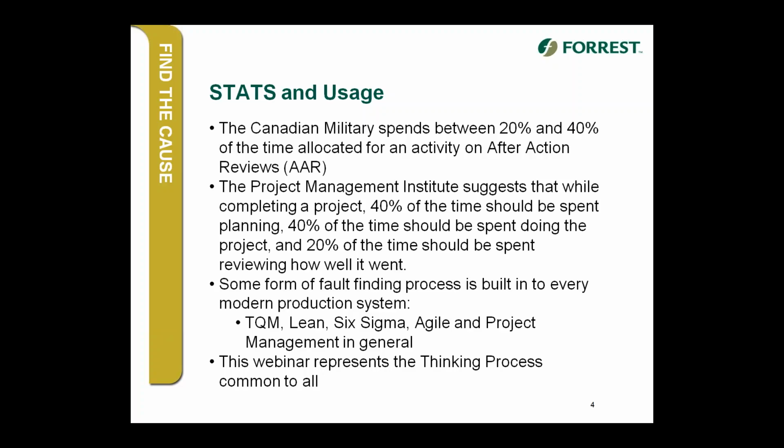The Canadian military, which I was a member of for quite a while, spend between 20 and 40% of the allocated time for a specific activity doing what they refer to as after-action reviews. So they spend almost half their time going over and trying to analyze what they did rather than actually doing the activity itself, so that they can learn from that and enhance their performance next time around.